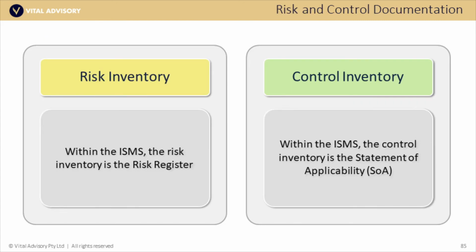And so when you go through that process of identifying your risks, you'll end up with an inventory of risks, the risk register. Typically in the risk register, I wouldn't capture everything until I'm satisfied we've probably documented the right risk, we've got the scenario right, and that when we do the evaluation of it, it makes sense that this is a risk. We don't really want to capture every possible nuance of every risk scenario, or else your inventory is unworkable. My worst case scenario is I saw a risk register with 1,100 risks in it, and I think that's just mental. I think that's just unwieldy and unusable, and it suggests that nobody's read the first 600 or 700 for a year or more.